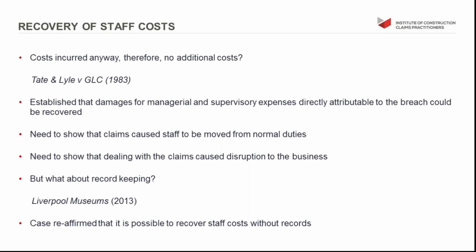And this similarly was a case of a contractor who sought to recover the staff costs, again without records. And this one went to court, and it involved the director of the claimant having to state her case and convince the judge that the staff had been moved from normal duties, had been dealing with the claims, and which had caused disruption to the business. Unfortunately, the case went in their favor, and they were able to recover their claim preparation costs.